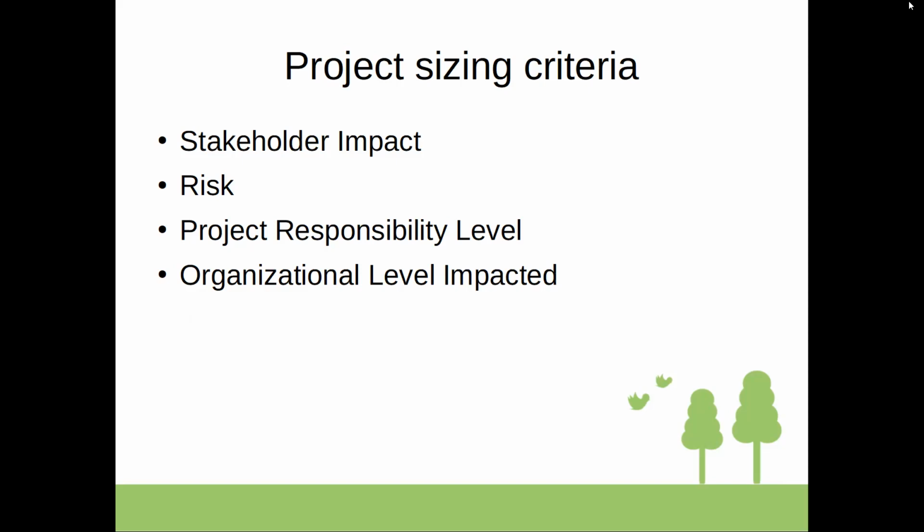Right, because everything changes. Also, sometimes those developers or whoever the people the project results depend on do not announce initially the risks or the difficulties that they might have, and eventually you understand that what they thought would be achieved in 1 month appears that cannot be even achieved in 6 months. So you have to change something. That's by the way part of the risk management.